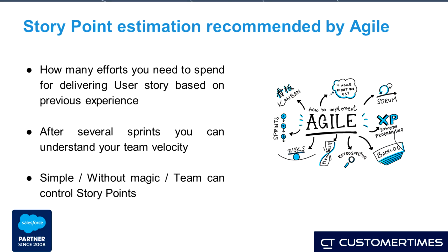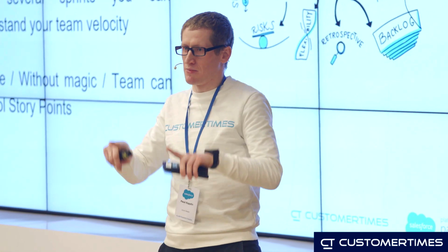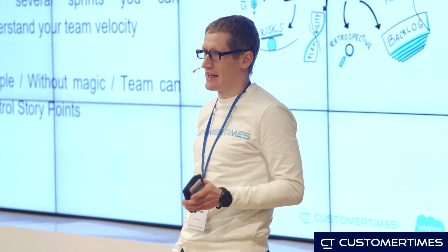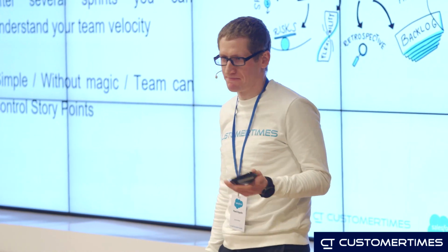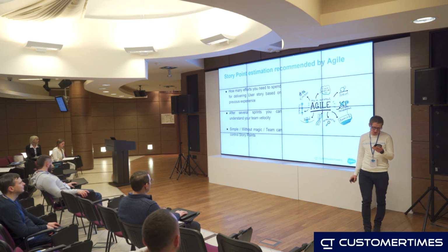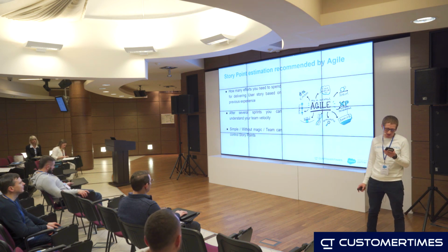Story points provide an estimation that is not in hours and not meant to be accurate. It should be consistent. We need to compare one user story with another. For example, this user story is like an XL t-shirt, and this is very, very small, maybe some minor changes. It's like an S size t-shirt. When engineers think of an estimate, they need to compare the story to other stories from the past in order to evaluate consistency.